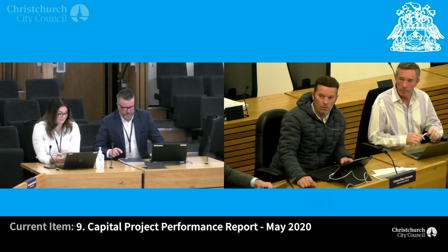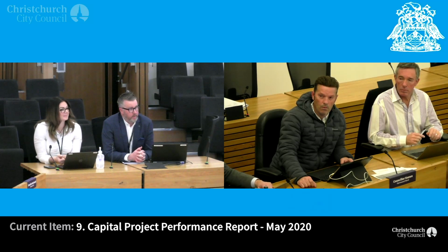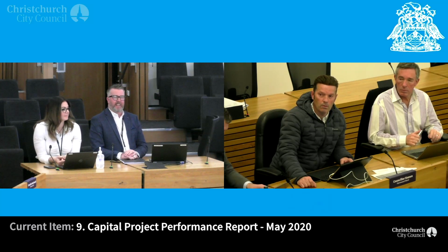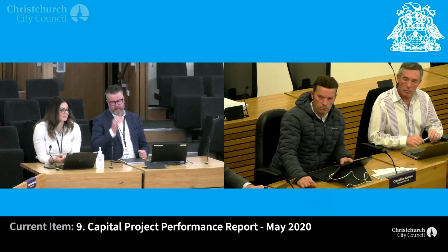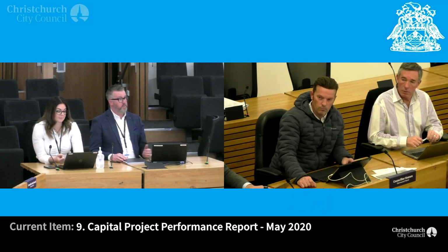We are, in fact, bringing in a very sustainable green building product out of Europe. We were going to go with X-Lam, so it's cross-laminated timber, the whole structure. It's assembled on site. It arrived late because the boat coming out of Italy was when Italy was being ravaged. So it's arrived, we've stood it up, the roof's going on, so we lost a bit of time. Contractors moved off site for the 7-week period. Back on site, the timber had arrived, and that's a consequential delay.